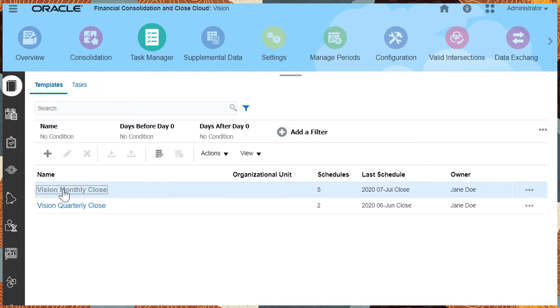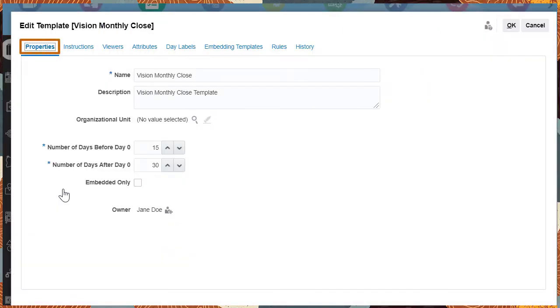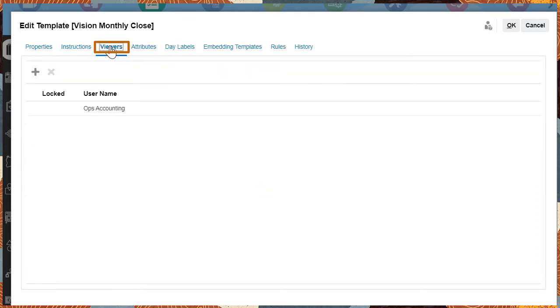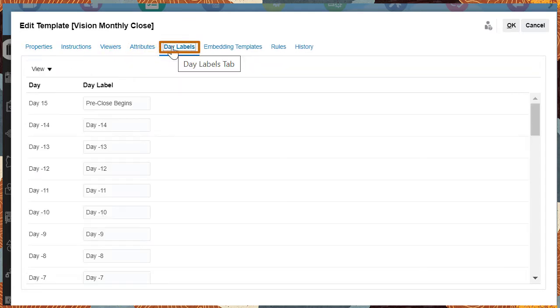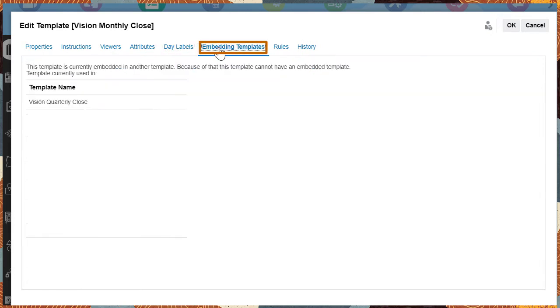Create a template by specifying the properties, instructions for the tasks, people who can view the tasks, attributes that act as filters, labels for significant days, and embedded templates to combine tasks from other templates.